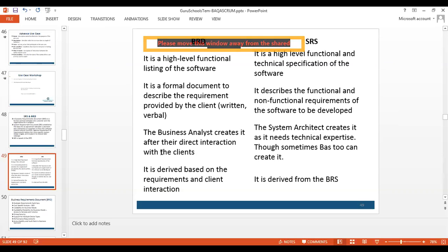But there are revisions, repetitions, and iterations. So it's not like the draft should be completely matured and then evolved. That's why normally business analysts have almost up to 30% of the project duration. So if there is a project of 1 year, you have almost 4 months to mature a BRD, and you normally work on concurrent projects. So there's a BRD of attendance management system. There's a BRD of a bank's ATM machine, new machine rollout. There'll be a BRD of n different projects. You work concurrently, so you have to think in that direction.